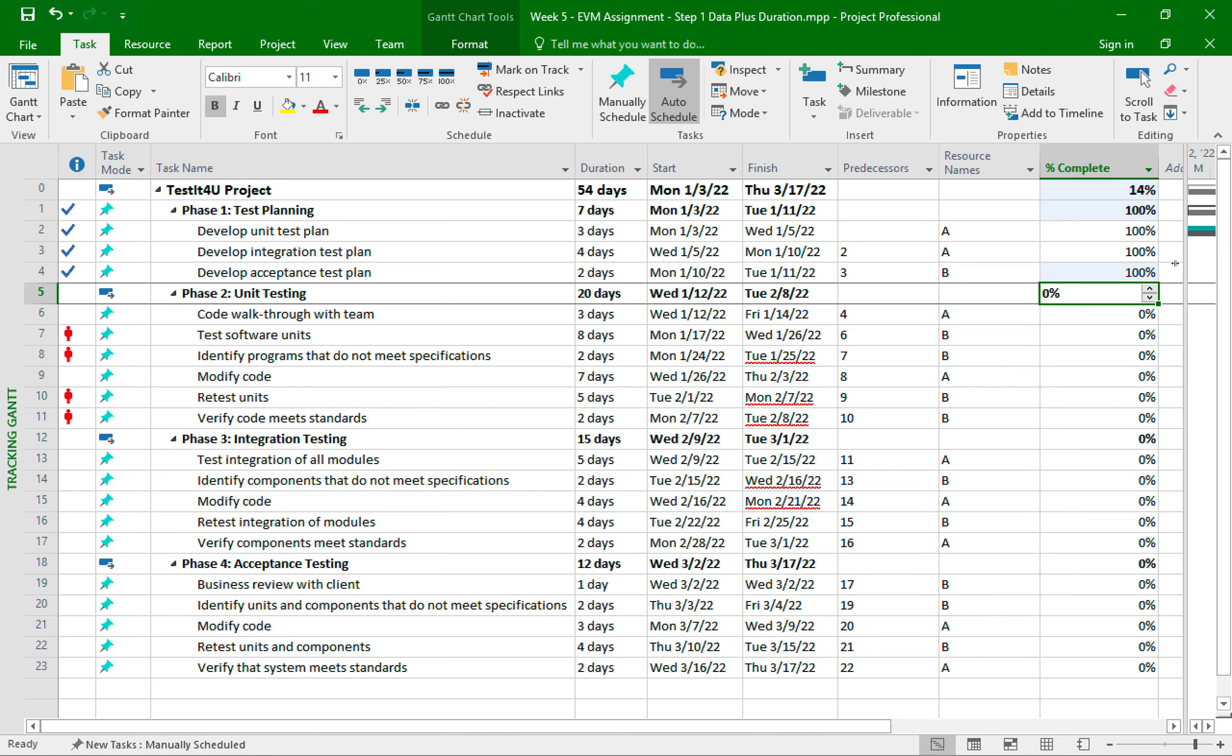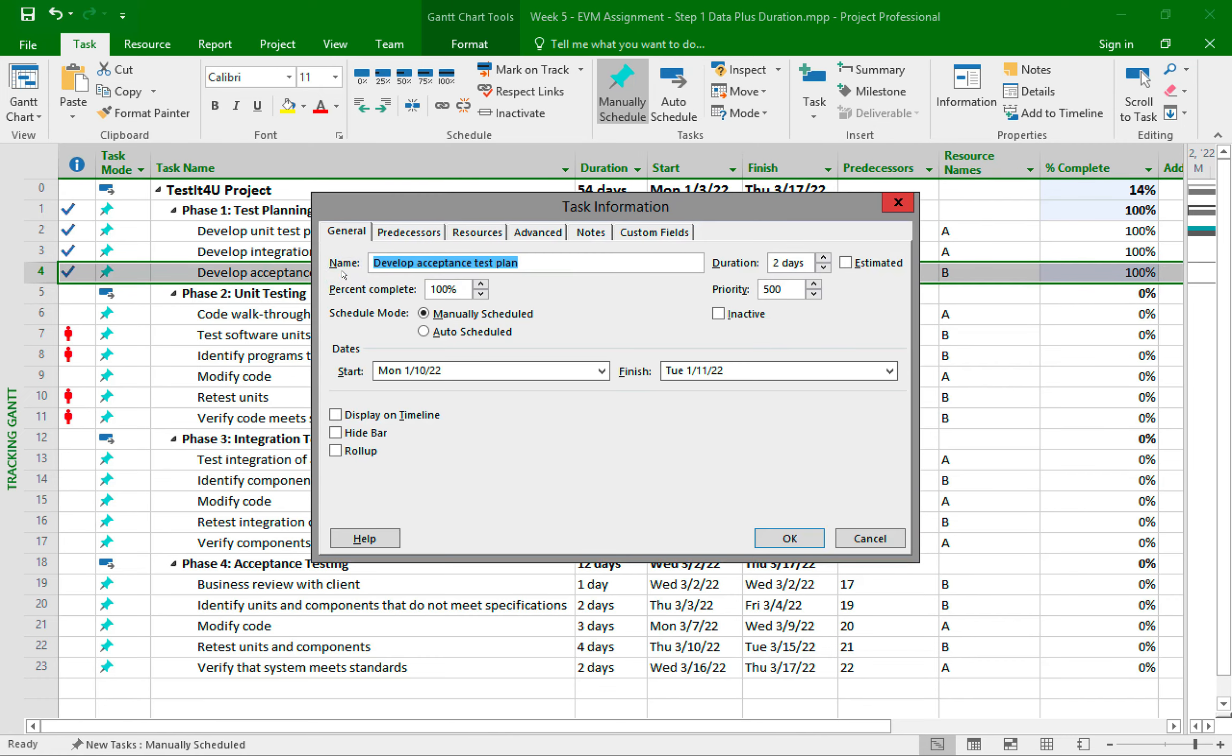And the final way to also update a percentage complete is to double click on any task. This opens up the task information dialog box. And from the general tab, you can see here is where we can update the percent complete.